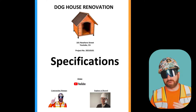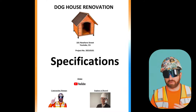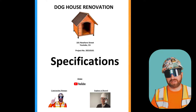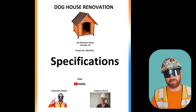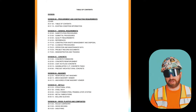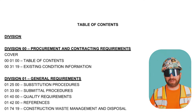Let's take a look at this spec book. The first page, as you can see, is a cover page. The cover page will usually tell you the project name, date, address, and the key players involved. Following the cover page, you should typically find the table of contents, which is your navigational aid throughout this document.